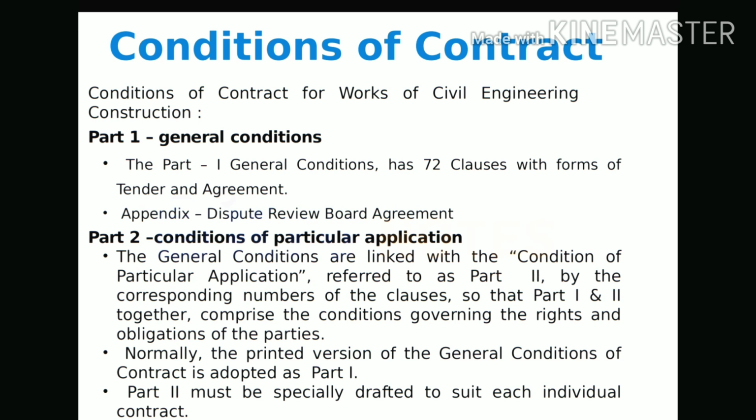Liquidated damages is a fixed stipulated sum payable by the contractor on account of penalty for delays and does not bear any relationship to the real damage to the owner. It is generally high and fixed per day for the excess period over that specified in the contract for completing the work.